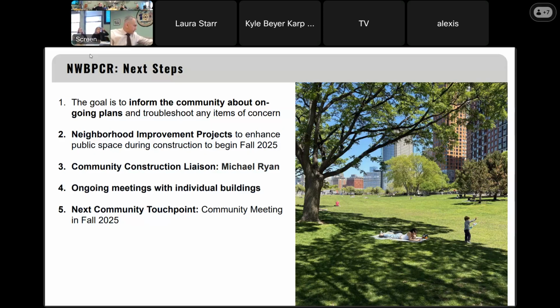This comes up in building meetings all the time, as it does at the Gateway and others: can we maybe not start that heavy machinery at 3 in the morning? To the extent that we can do that, we try, but we also need to make sure the project is proceeding at pace, because if you cut enough hours off each day, it becomes 6 years instead of 5.